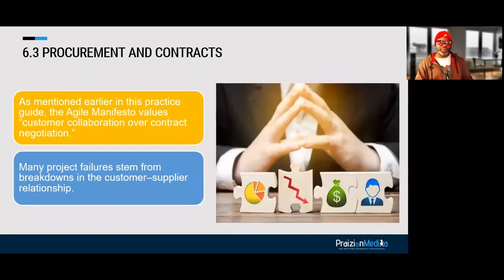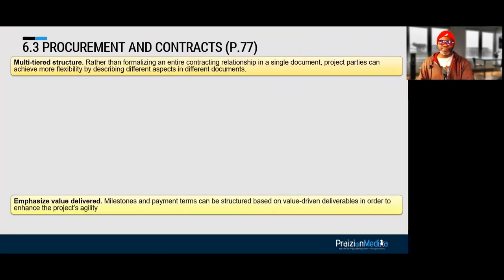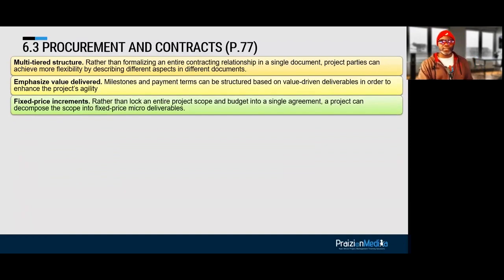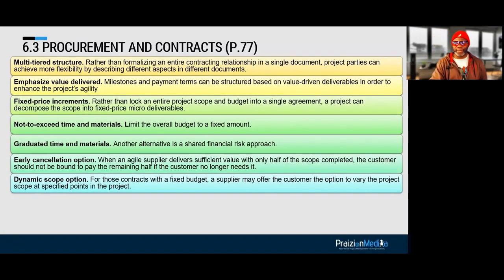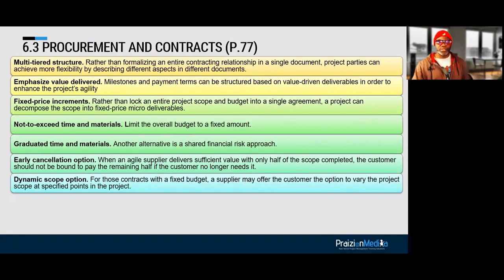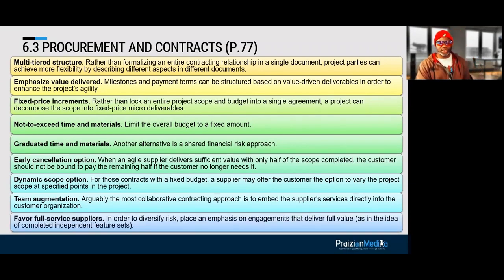We also talk about procurements and contracts on page 77. I would highly advise knowing those contract types: multi-tiered, emphasizing value delivered, fixed price increments, NTE time and materials, graduated time and materials, early cancellation giving people an off-ramp, dynamic scope option, team augmentation, and favoring full service suppliers.